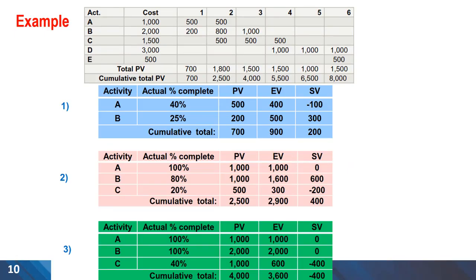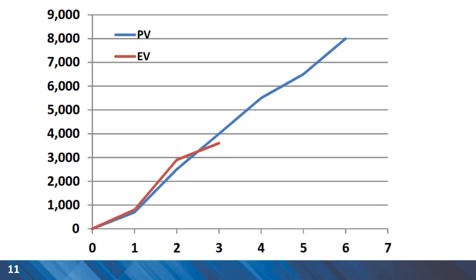In this example we have planned values and earned values given to us. We can calculate the schedule variance as the difference between earned value and planned value. Schedule variances are tabulated in the fifth column of the table. We encourage you to pause the video and calculate the schedule variances yourself. Cumulative total figures can then be used to plot planned value and earned value for each period of time.